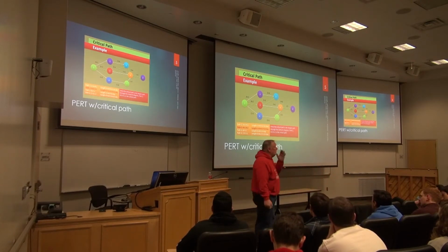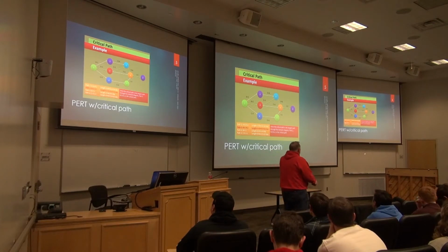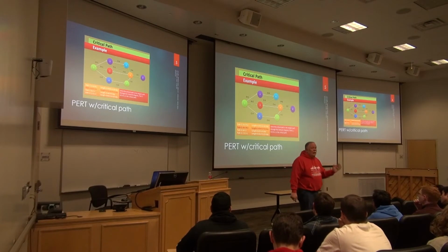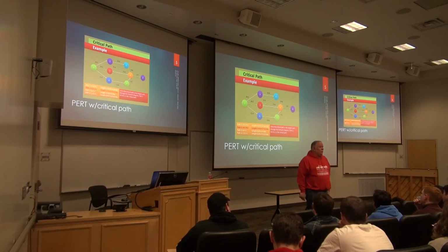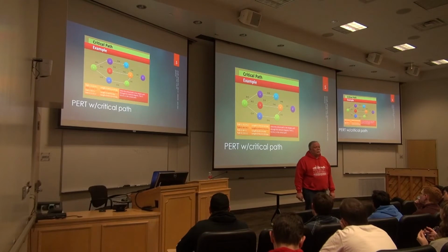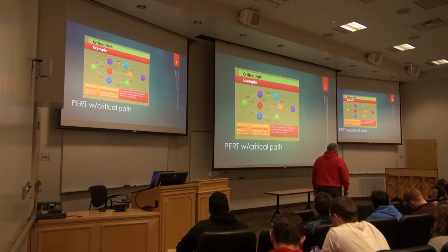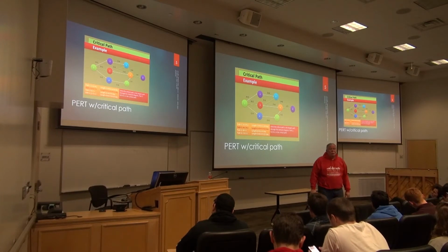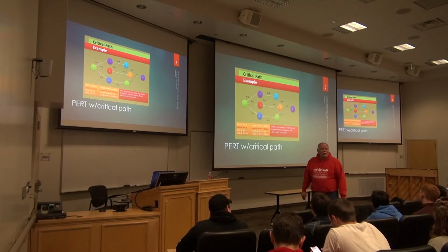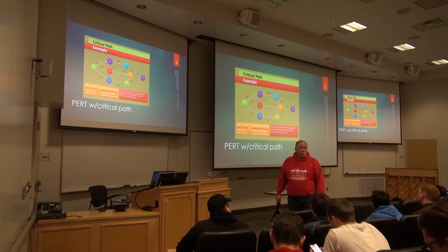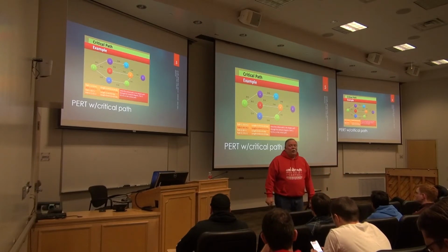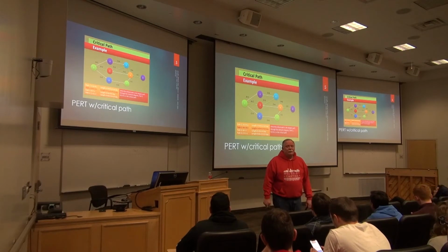Now, you have a fixed deadline for your demo. So when you start to make your PERT chart, work backwards and say, we really only have 3 days to do this particular task. And then you say, we can't get that done in 3 days. Then you ask, what features can we drop from our demo to allow us to get done by this fixed date? In other words, you're having to do one of the sins we just talked about, which is you have to deliver on a specific date regardless of what you're building, and all you can do is drop features.